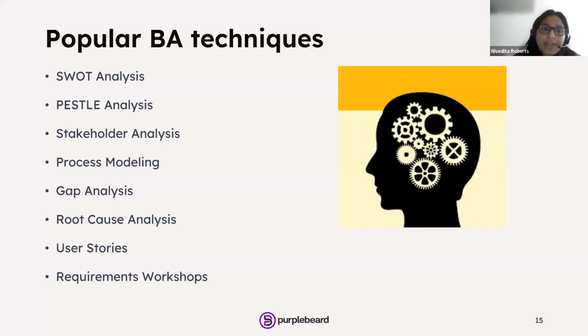Stakeholder analysis. Gosh, that is essentially where most of your work is going to be, where you're dealing with stakeholders. Stakeholders are any individual, any organization, any party who has an influence on your organization and who will get influenced or who will be affected by the work that you are doing, the project that you have in your hand. And hence, stakeholders are very important. Then again, you want to understand not all your stakeholders will be very important to you as a business, depending upon the interest that they have in your organization, the power that they exert on your organization, your business processes, the operations of your business. These stakeholders are plotted in different sectors. So there's something called a power interest grid. That is what is used when you're analyzing your stakeholders.